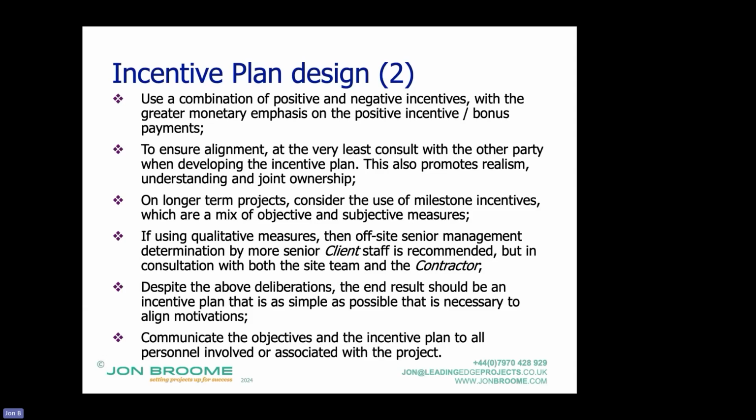There is a big temptation, as a contractual and incentive geek that I am, to go, and this is of any expert, to come up with something which is really complicated and clever and whiz-o-whiz. The problem with that is unintended consequences. And I've seen this time and time again when you look at complex incentive mechanisms. Complexity does, first of all, as I said, create unintended consequences, but also there can be so many things that people have to go through and hoops that people have to jump through. And if I achieve this, then I have to achieve that, that actually, it fails to work.